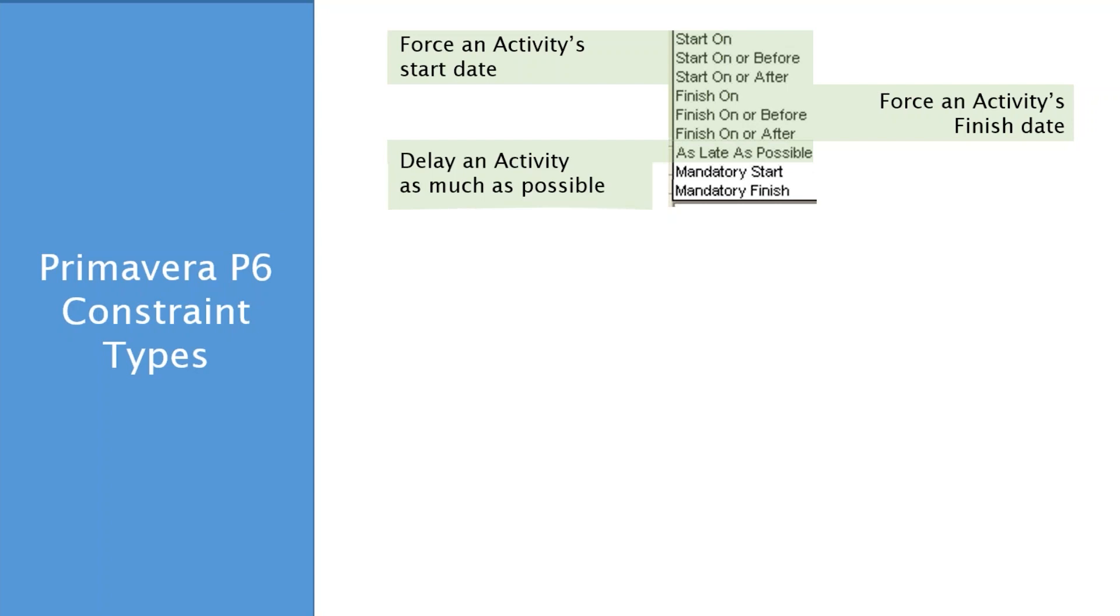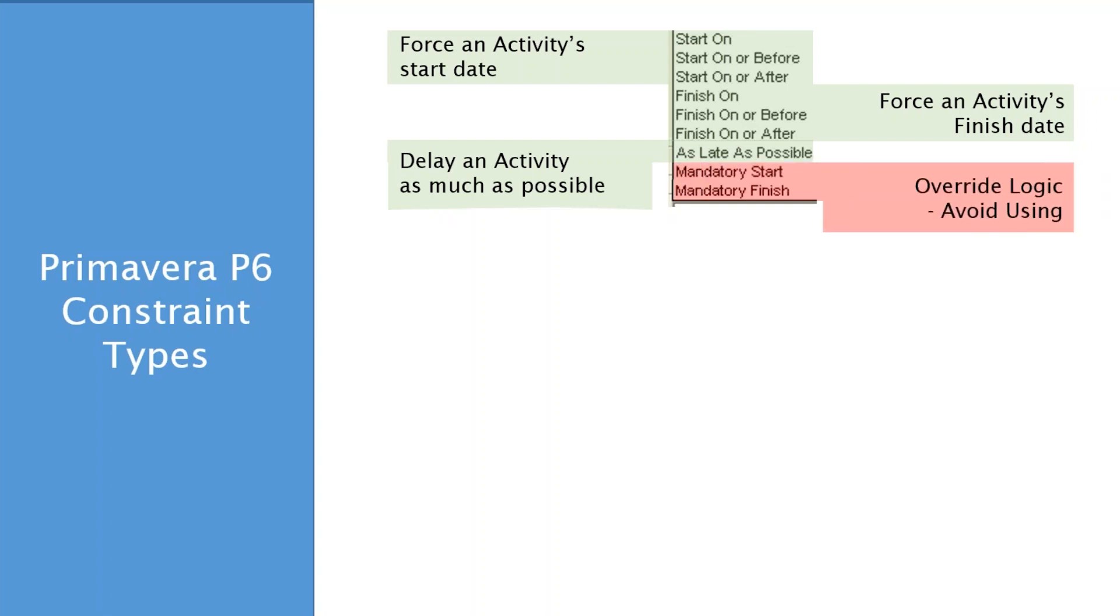As late as possible is a unique one, but it's there to help you delay an activity as much as possible. We did a video on recently, an Ask Plan Academy video on this constraint. It's also called the Free Float Equals Zero Constraint. It's a constraint that sets Free Float Equal to Zero. And Free Float is the delay between an activity and its predecessor. I don't want to dive too deep into that constraint right now, but I do want to tell you about the other two. The mandatory start and the mandatory finish. So these two we tread lightly with because they can override logic. We avoid using them and we're going to get into why in just a minute.